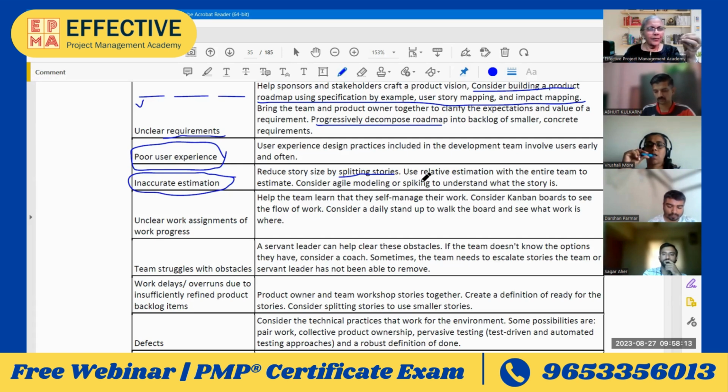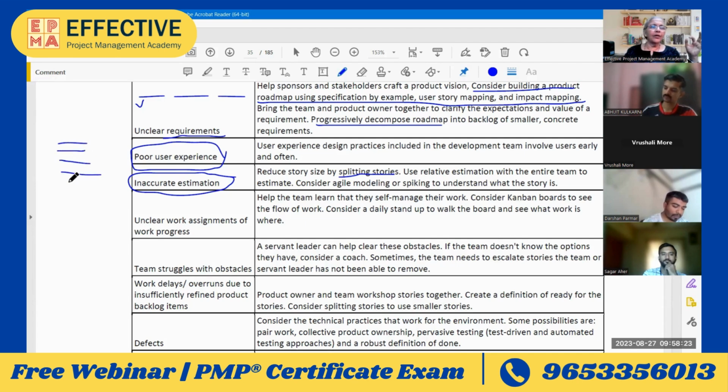Instead of saying this story is going to need 49.75 hours, think about these are 5 stories. This is the smallest story, which is fairly estimatable. So we think that this is going to take 8 hours, 1 day. Okay, I'll write 1 day.